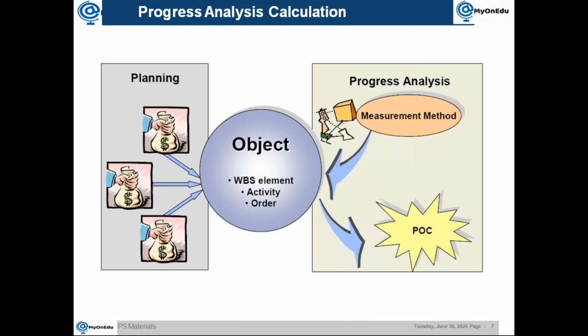Now, how the calculation works: the planning will always be taken care of, because this value will always be considered from the planning. So it will be the planned cost, or you can use budget as well. Basically it will be planned cost. Important here is that it is not the planned cost on hierarchical planning. It should be cost element planning, or you can use network costing, both are the same. That way it will consider the planned value.